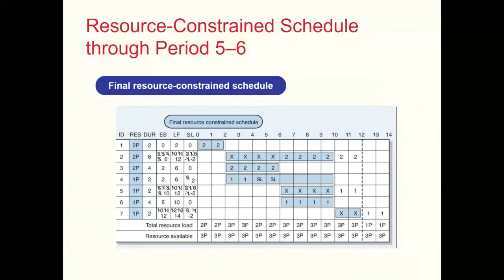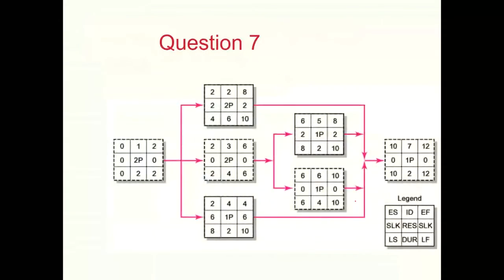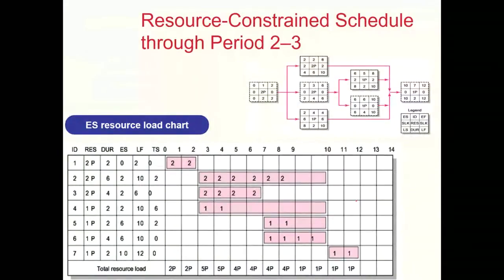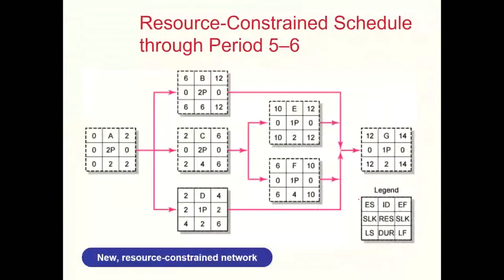And we will postpone the beginning of activity 2, and you can see again there was a bit of a conflict with activity 2 and 5 taking place at the same time, leading to resource peak. So we have decided to delay activity 5 so that it happens after, so that we are falling in line with the required resource requirements. So this way we have demonstrated how we can make use of